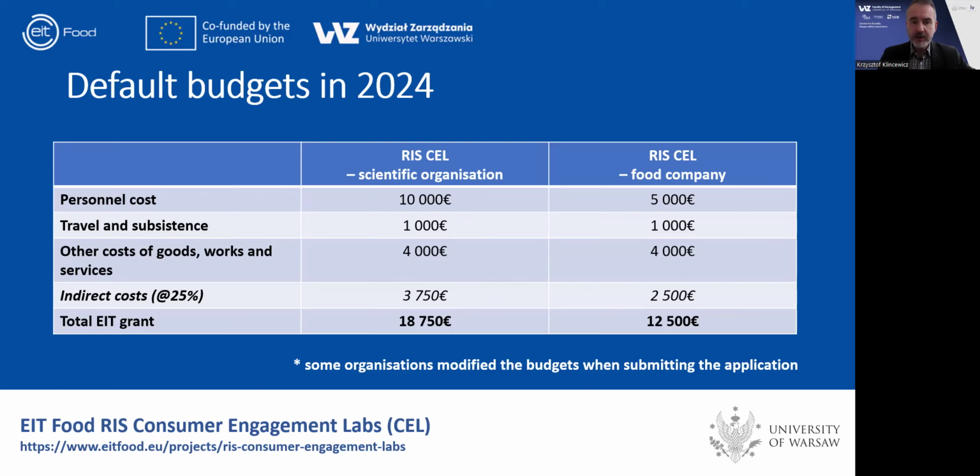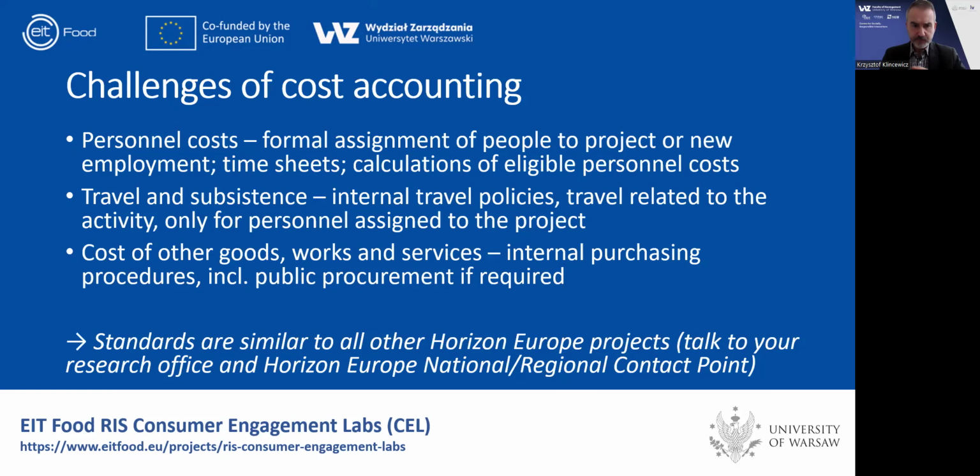But don't worry, during the year, we are still going to have a chance to modify the budget. So there will still be an opportunity in the middle of the year to potentially increase one of the categories and decrease the other. But in general, those of you who already started asking us those questions by emails, look into your project application because each organization submitted the target budgets, and this is exactly what you are going to adopt as the basis of your work this year.